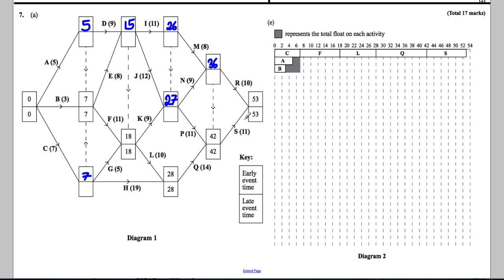Let's go backwards now from 53. 53 take away 11 is 42. To get to the next node, it's either 53 take away 10 = 43, or 42 take away nothing, and we're looking for the smallest, so we choose 42. Then it's 42 take away 8 = 34, or 42 take away 11 = 31, or 42 take away 9 = 33. The smallest is 31, so we go for 31.